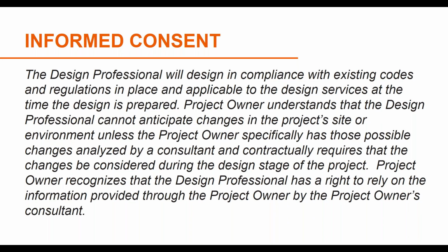You know, what parameters are considered during the design, what investments will the client make to increase resiliency? And firms often use a checklist of questions that are project specific, geographically specific, and identified as to known conditions or anticipated changes to the climate. And once they do that, they ask their clients to sign an informed consent statement such as this. Informed consent can be used in situations other than addressing or not addressing climate issues. So consider using a similar informed consent provision for other situations, because that will be able to document that the client understood its risks.